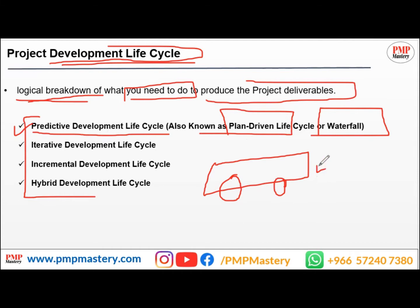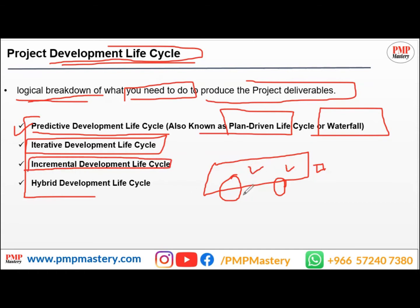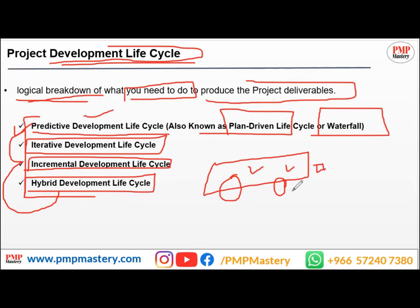You may also use the iterative development life cycle or the incremental development life cycle. And lastly, you can use the hybrid development life cycle, which is a combination of predictive and agile — for example, using predictive for planning and design, and iterative or incremental for testing and execution. The choice depends on how clear and complete your requirements are.